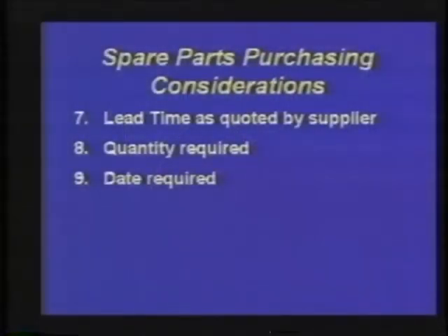You have to know the date required, and hopefully the date required is outside of the lead time quoted by the supplier. If it's inside the lead time, then that says you may have to do some hardcore negotiation and discussion with the supplier to get it in sooner than what he or she had quoted relative to their, what I would call, normal lead times.